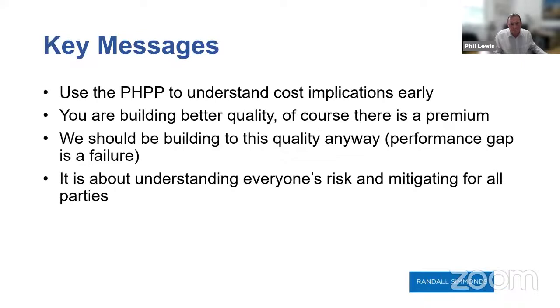I might dispute that. So key messages for me: if you're a QS, if you're looking at the cost, use the PHPP to understand cost implications. Some are very protective of their PHPP, which is great, but we need to do some modeling. We need to change a few things and see what works and what gives a bit better understanding. So my hope in any project is to use that PHPP to be as commercial as possible, as well as provide a good design.